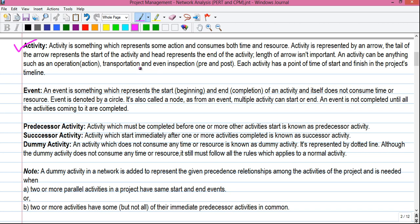Next is the event. An event is something which represents the start — that is the beginning — and end — that is the completion — of an activity, and itself does not consume any time or resource. An event is denoted by a circle, also called a node. From an event, multiple activities can start or end. An event is not completed until all the activities coming into it are completed.